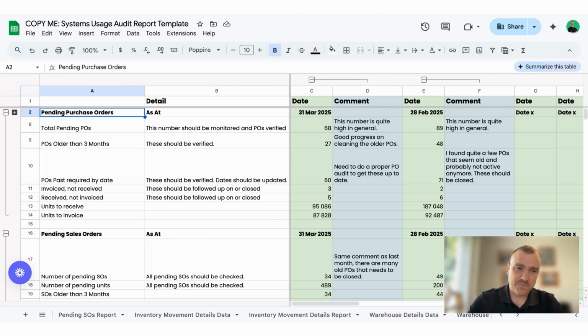But then also, when you start looking at things like cash flow, you can quite easily calculate the amount of cash that you will have to spend in the future if you look at the required by date, plus the accurate required by date, plus the supplier's terms.